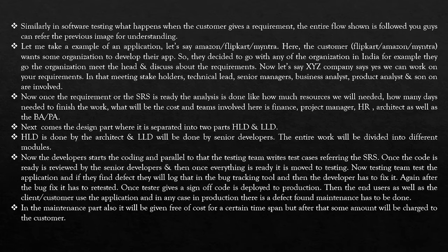When the term maintenance comes, maintenance is never done for a longer period of time for free of cost. I cannot maintain an application for 10 or 20 years free of cost. There will be a proper contract when the requirement comes. At that time there will be a contract between the customer and the organization, like we'll be developing the application and maintaining it till such date, or till such year.